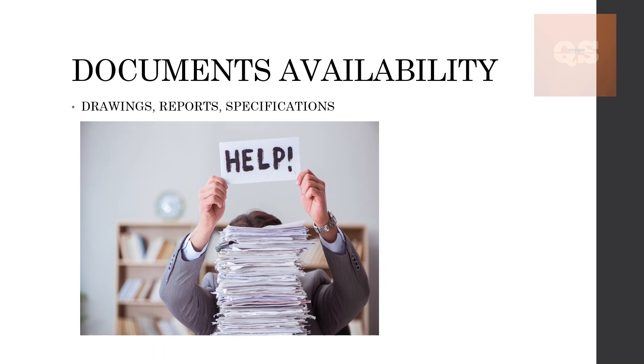Usually there will be a drawing register available with all the documents. Most clients or companies provide these to the QS consultants or the QS company. You can just check all your drawings with this register and find out if anything is missing.